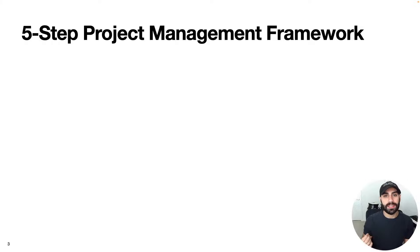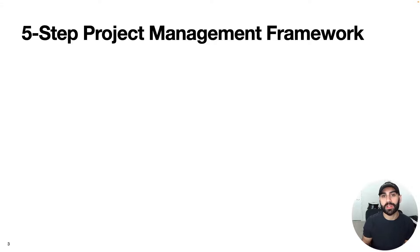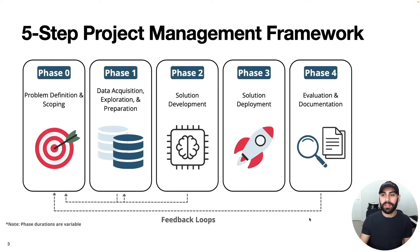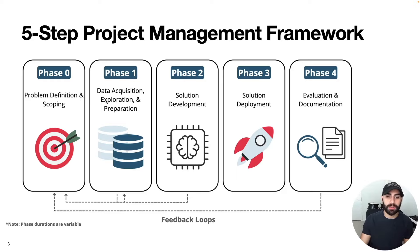However, there are some unique considerations for data science projects, which brings up a five-step project management framework I like to use when approaching a model build or the development of some other data-driven solution. The framework is broken down into five phases starting from phase zero, which is the problem definition and scoping phase. Phase one is data acquisition, exploration, and preparation — we can also think of this as all the data engineering work.